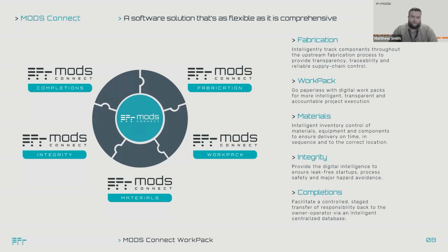So we're looking at the deliveries in the form of advanced shipping notices in the materials module. We are then looking at receiving those materials at the warehouse, which allows us to record the received quantities, storage locations, heat numbers, serial numbers, any of the important information that is associated with that item once it arrives. From there, we can do some stock management, stock verifications, stock adjustments, of course, before we look at issuance.